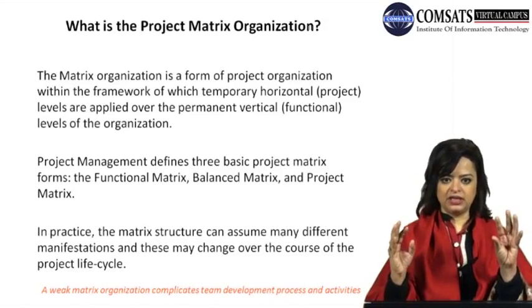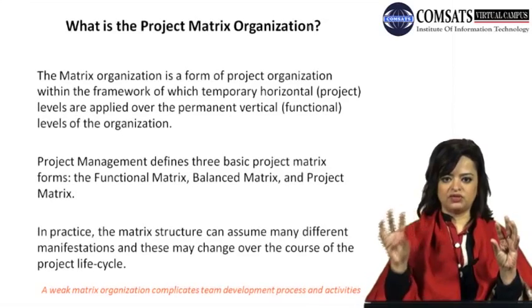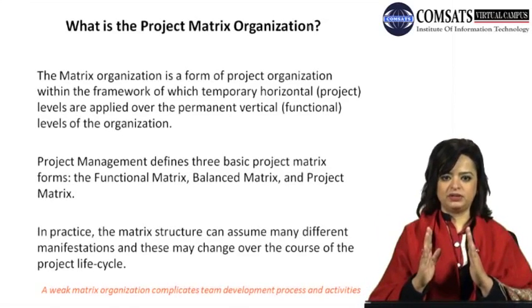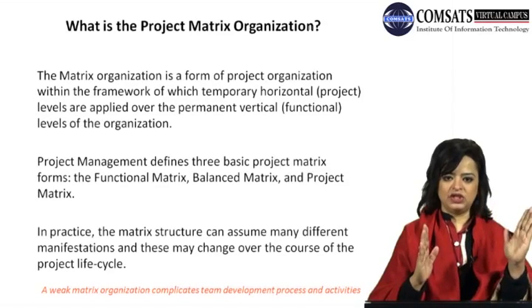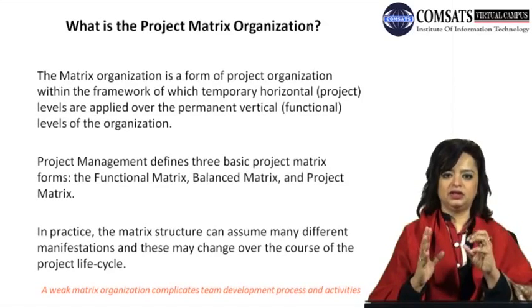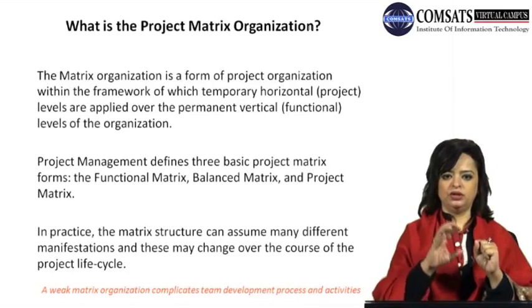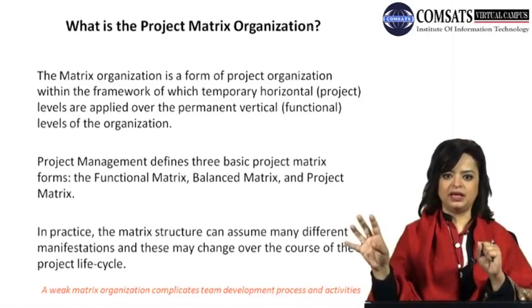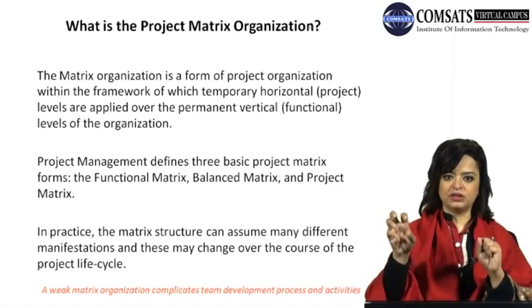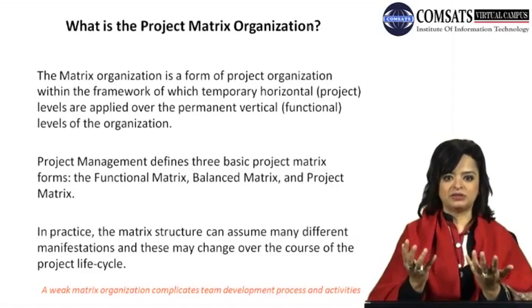Remember, there is functional organization on this side, there's projectized, and in between there's a matrix organization. So organizations that are early in the concept of following project processes are the functional matrix. The organizations which have matured and groomed their processes and are totally trying to become more projectized are the project matrix, and in between is the balance matrix.